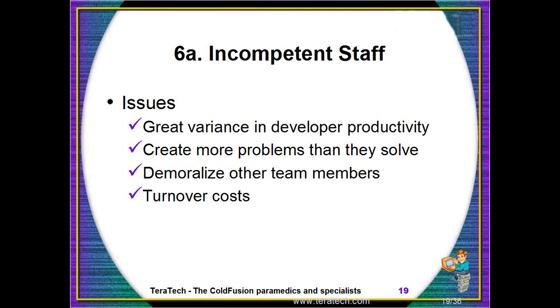And it also relates to increased turnover costs. By that I mean if you have to bring a new person into the project to replace someone else, you've got all the learning curve and training time that not only takes that developer, but also all the people who have to help him or her get up to speed. Because generally on larger projects, there's a lot of time spent communicating between team members. So every time you change team members in and out, it adds to your costs, let alone any hiring costs of bringing new team members in.